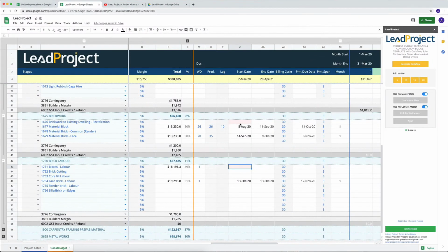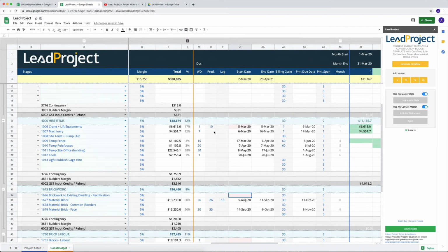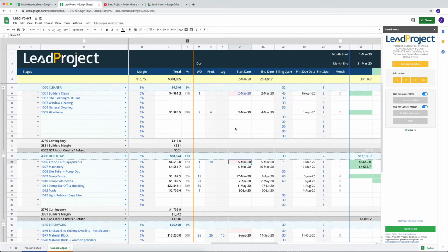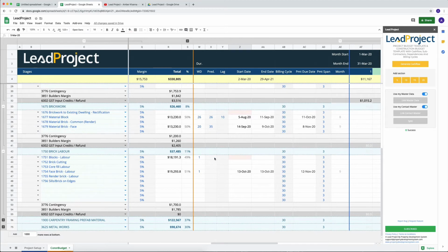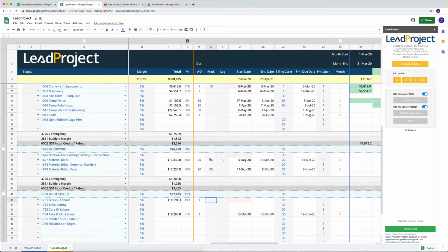And the first section, as I said in the previous video as well, is always going to be manual, or it has to be given a predecessor. So if I say it would start after 9th of October, whenever this ends, I can either put in 37 in the predecessor column, or I can look at another task.